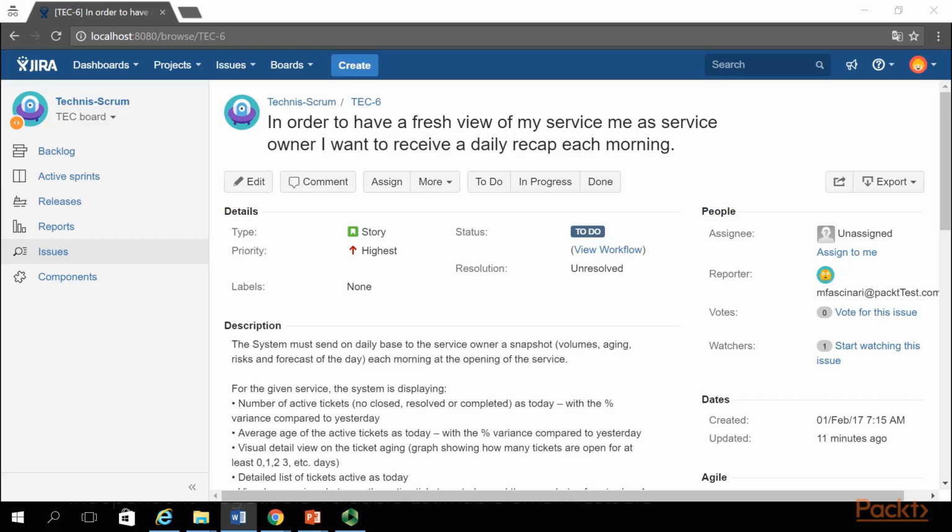We have encountered teams that reserve a test sprint in their Scrum implementation. The usage of ad hoc sprints to execute the test is a bad practice in Agile software development. The goal of the sprint is always to deliver working software that can be translated to value for the user as product increment. In addition to the test case presented here, we included in the documentation attached to the course another example. We encourage you to use those examples to define the other test cases for all the user stories or subtasks.